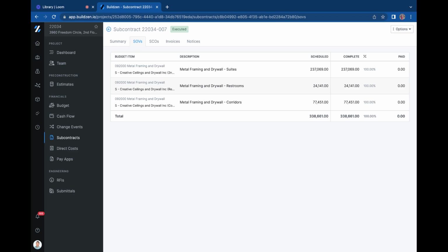So that's super beneficial because, let's say I didn't check this, and the foreman on site for this trade didn't receive this information from his office. We would have gone through the tag process, tracking hours, and then all this information would have been sent to the office. They would have gone through the pricing process and all this paperwork, all at the very end, to figure out that, oh wait, we were already paid for this. And they wasted a bunch of time and effort.